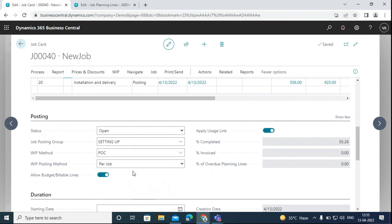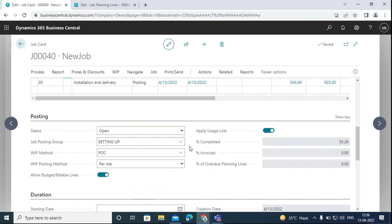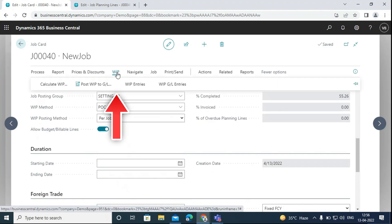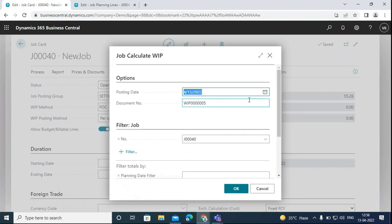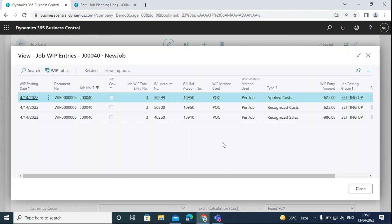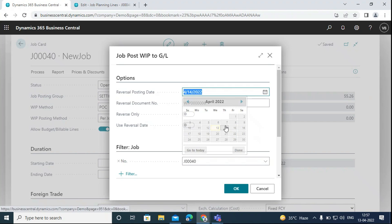We have different WIP methods. We have selected the percentage of completion method — the system will calculate the work in progress sales and costs from the percentage of the project completed. This is the job posting group we have set up, and the WIP posting method is set per job. We can see everything is currently zero in the WIP and Recognition Fast tab. We will go to WIP, select Calculate WIP, select posting date 14th, enter the job number, and click OK. We can preview the posting accounts to see WIP sales and cost amounts posted to these GL accounts, then run Post WIP to GL.